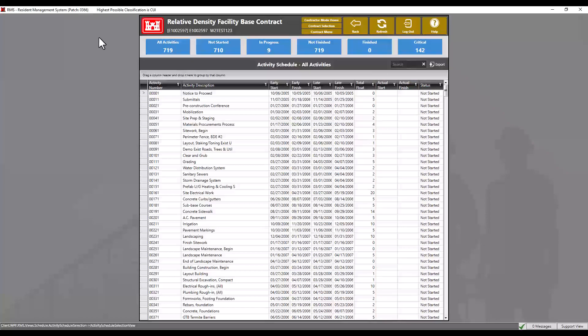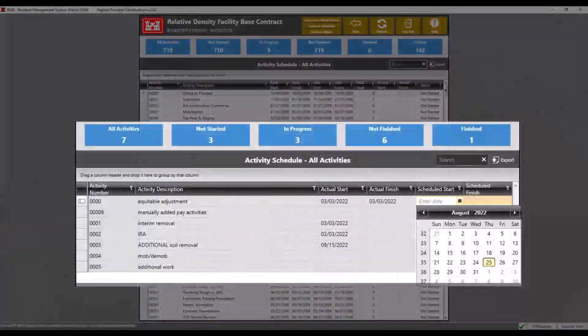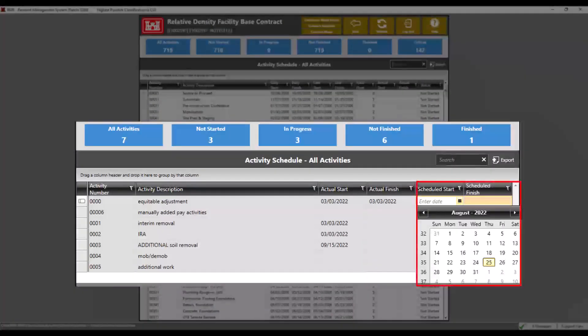Once the SDEF file is approved for import, after importing you can view the new schedule in the activity schedule module. For manual entries to the activity schedule, simply click the scheduled start and finish dates column and choose the appropriate dates for each activity.